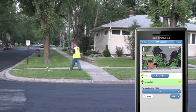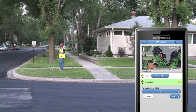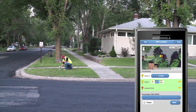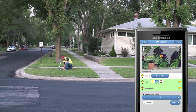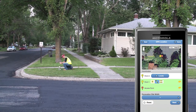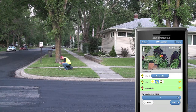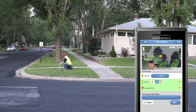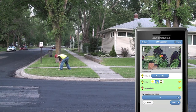Now we'll start mapping out our actual job site by capturing the GPS point where our bore will begin. It's always a good idea to mark your flags by putting your company name and point number in the capture screen, in case there is another project going on in the area — this will further eliminate confusion for the locator. Additionally, we'll mark the ground with white paint in case the flag gets moved.